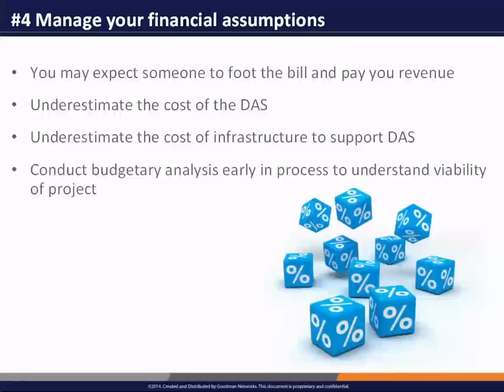The cost of the DAS can run easily into the millions of dollars on a campus, and there's a tendency to underestimate what's involved financially in making a commitment for the construction of the DAS. At the same time, the universities and campuses need to take a close look at what's their infrastructure requirement and what's the cost related to providing appropriate infrastructure services to support the DAS. I'm going to touch on that in the next slide or two. But there can be a tremendous cost for fiber transport, for example, between buildings that sometimes gets underestimated.